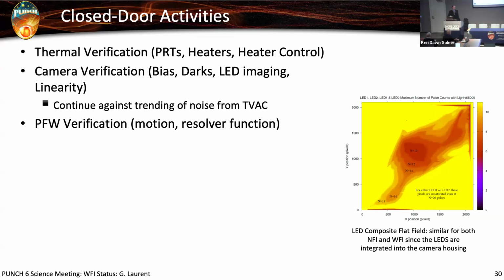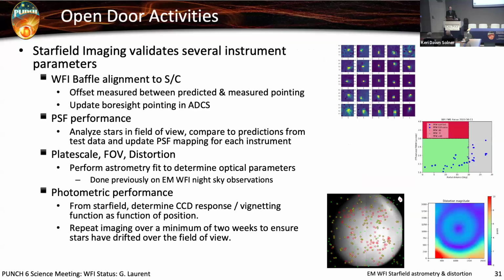So there's a number of things we can do during spacecraft commissioning with the door closed. We fire up the cameras, and that will happen just a few days after launch, so we'll be back at the MOC for that. We can do thermal verification, again using our onboard calibration lamps, look at our bias, our darks, LED imaging, and linearity, and then verify the polarizing filter wheel as far as the motion and the resolver repeatability.